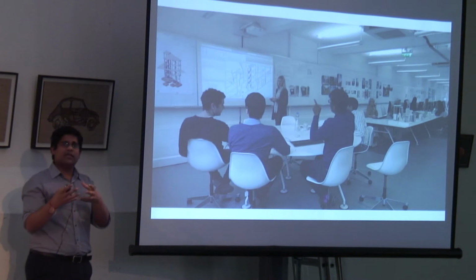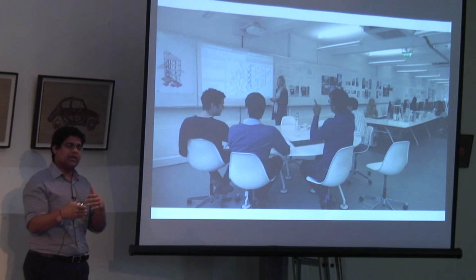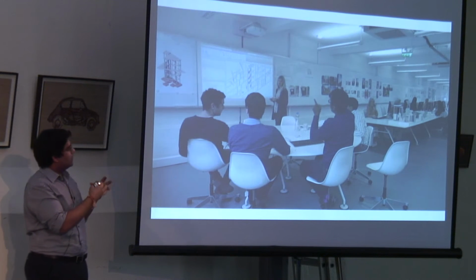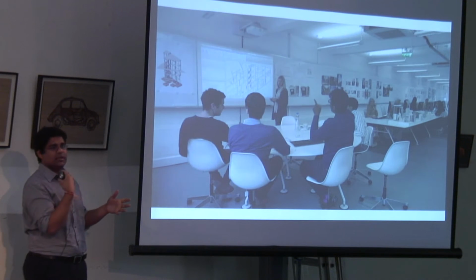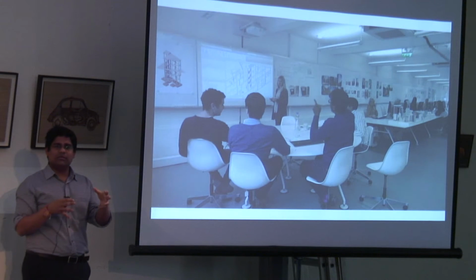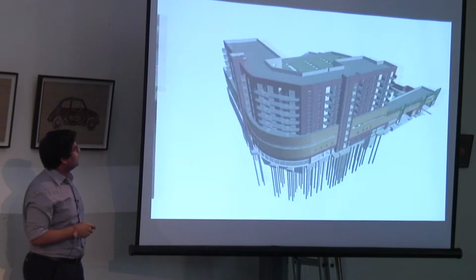So if there are any queries at DTM, for example, we're able to resolve it rather than it just being another action or a note in a huge Excel spreadsheet. So it's allowing everyone to collaboratively resolve things in the meetings as opposed to just another action that gets taken away. And as a result of that, there's no sense of, oh, you did it wrong, your model's wrong. It's actually just said, okay, fine, we need to resolve it. Let's just get on with it and move forward. So that's been very different.